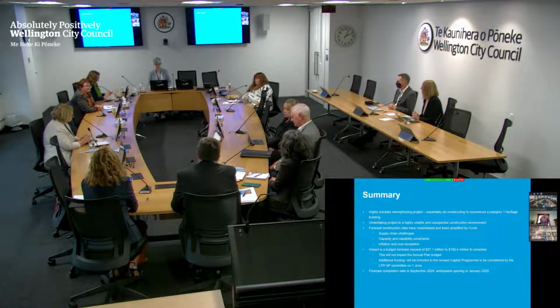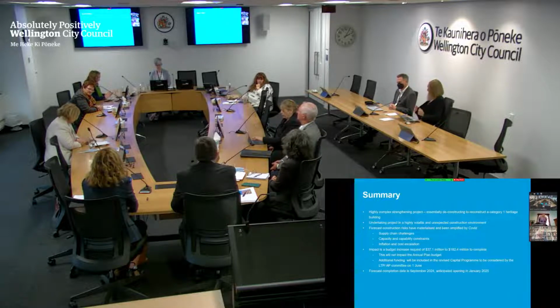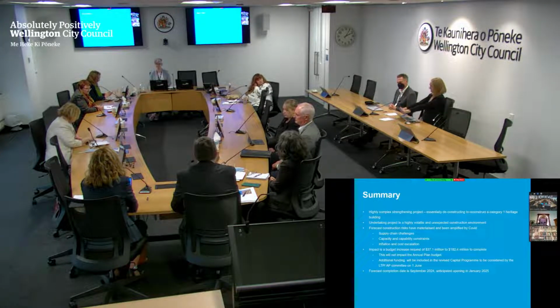So I think the final point I will make, and I think it's very important that Danny has mentioned this, is that this is not an exact science. The team have done a lot of work in preparing this advice for you in trying to anticipate the risks yet to be realised, as well as the risks that have already been realised and have impacted on our contingency. And we've tried our best to advise you on an increase in budget that we hope will be sufficient, and we plan to be sufficient. But there is little further value engineering to do to change this situation, because the real costs are in the structural upgrade.